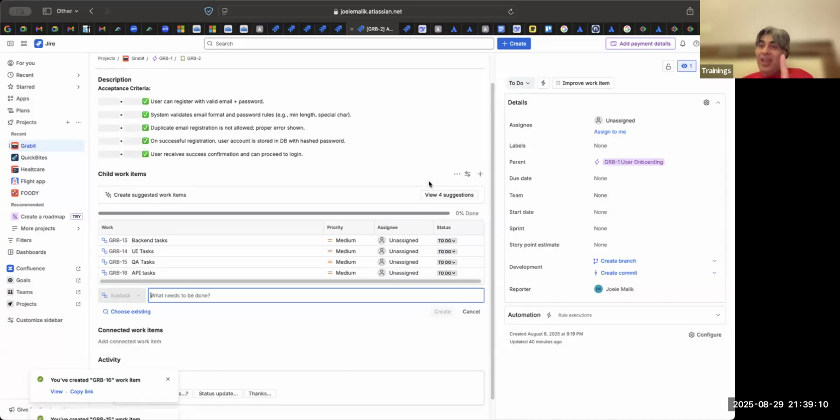estimates the story. Why? Because you want a multi-skill team. You want more than 2 skills. That is why we talk about T-shaped skills. So backend and UI people will know each other's work. Sometimes you will also encourage people to know basic QA testing also. And testers should know at least a bit of what their developers are getting into. So for estimations, everybody should be a part of it.